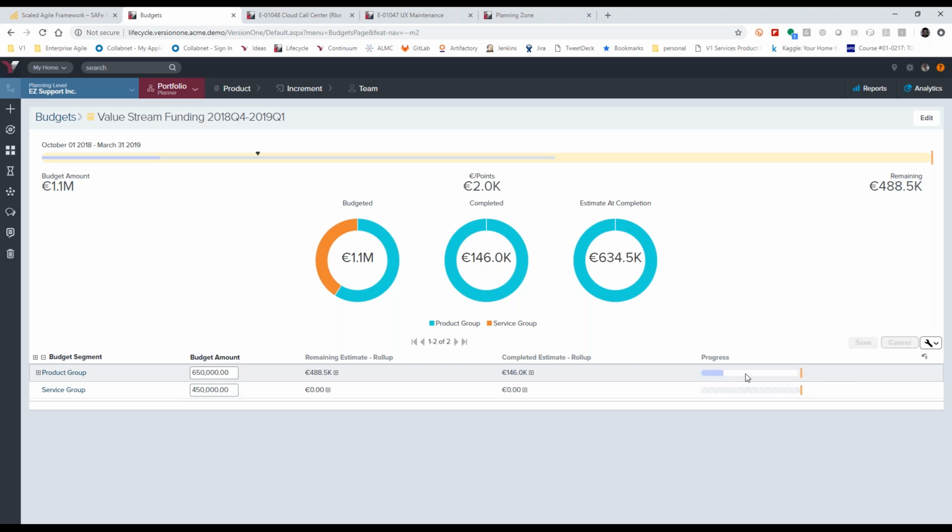And in this example, I can see that the product group has some capacity remaining. As we look at this, there's an opportunity to deliver additional work, but we're currently managing to fiscal responsibility. As we exceed the budget for that, it will help to drive decision making about what is in scope and what is out of scope, and how rigorous we need to be in leveraging weighted shortest job first and the reprioritization of our backlog in real time.